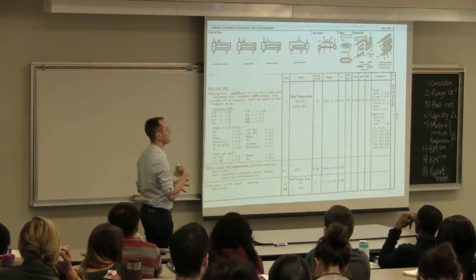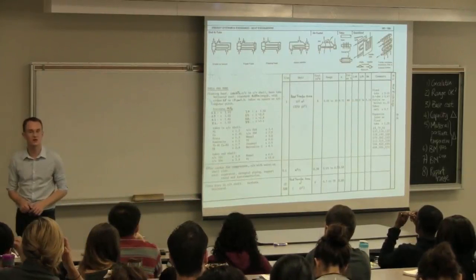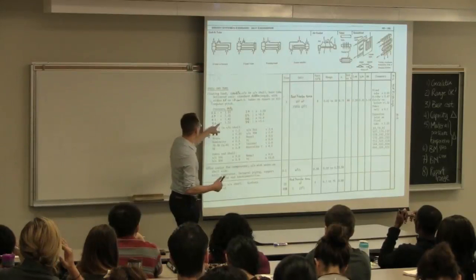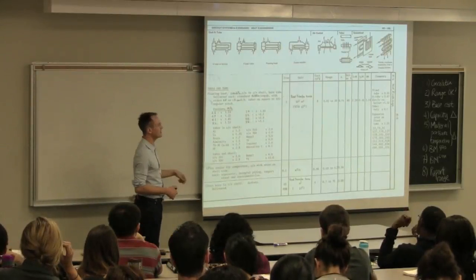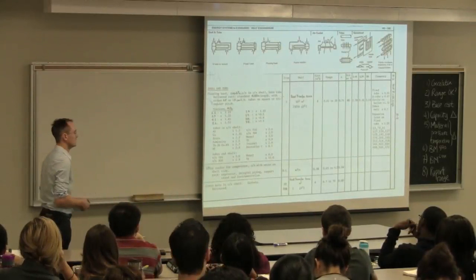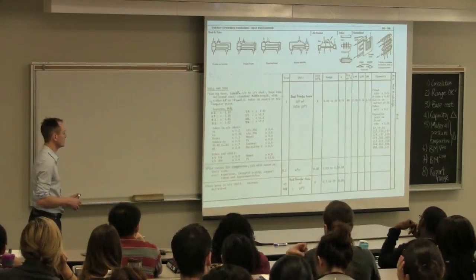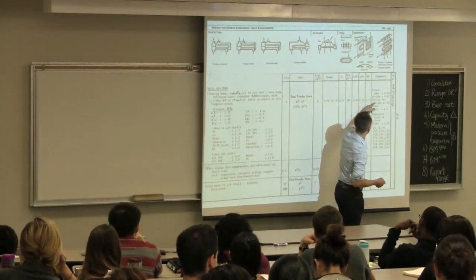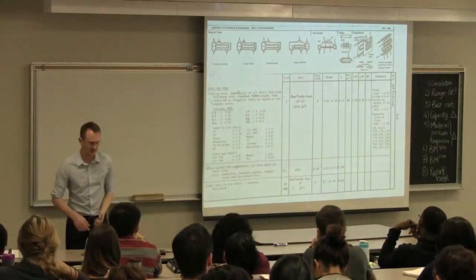That product we then multiply again by a factor of 3 to account for the stainless steel 316, for the shell and tubes. So these are multiplicative effects. We don't add up the 1.25 plus 3 and then use the sum of those to multiply the base cost by. We say the base cost times the capacity inflation raised to that exponent, times the pressure adjustment factor, times the stainless steel adjustment factor. Okay, so these are multiplicative costs, very, very important. There are some other multiplicative costs listed here in the comments. If you were looking at U-tubes or you had a kettle reboiler included, or you were looking at the cost of the tubes only, those factors are given over there.